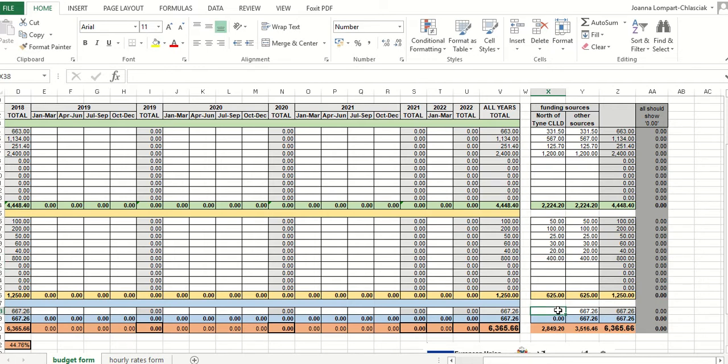And then you may want to split your indirect costs 50-50 as well. Right, we've got a minus figure, so there's a mistake. And the mistake is that I divided it by 3 rather than 2. Yeah, zeros everywhere. So these two figures are exactly the same. And what's our grant value? 50%. So that's fine for an ESF project.